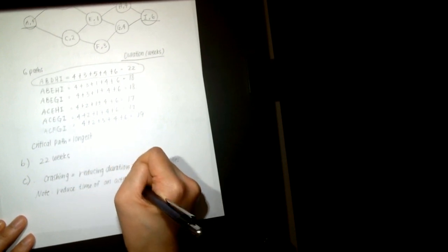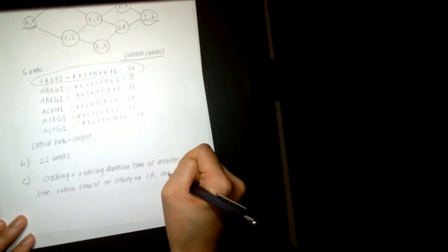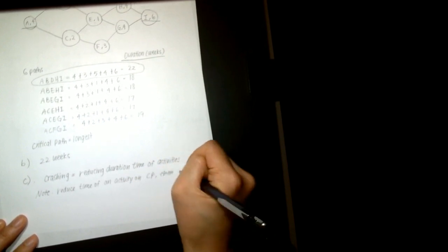And note here that if you reduce the time of an activity on a critical path, it may change the critical path. Critical paths may change.